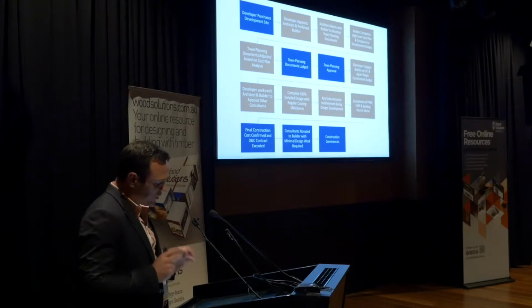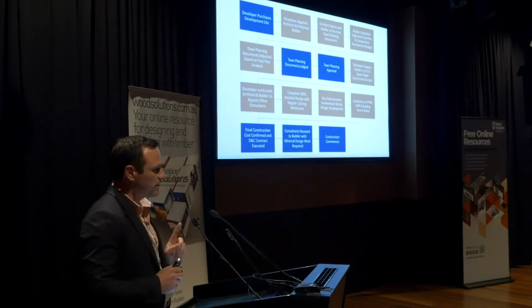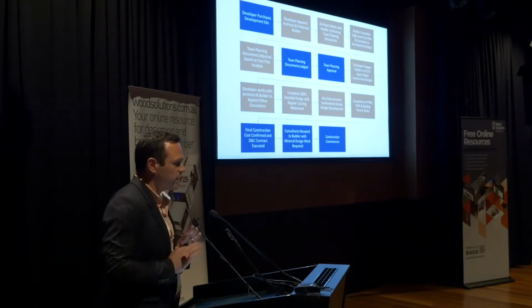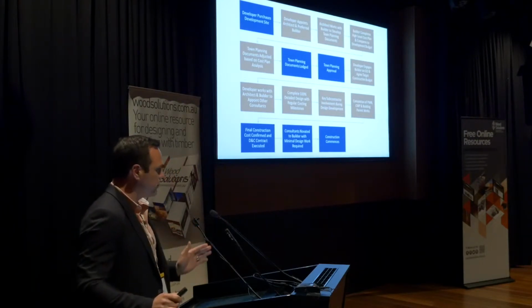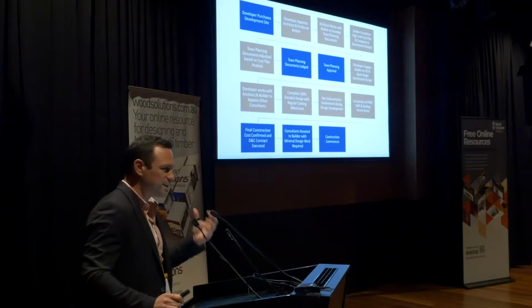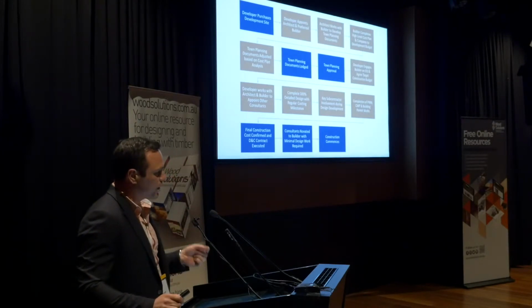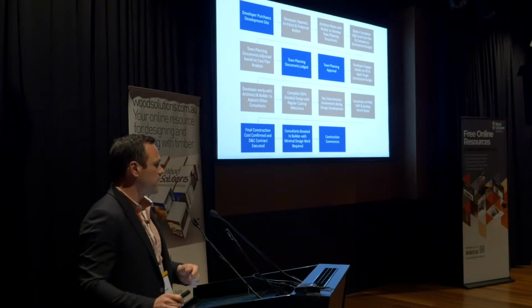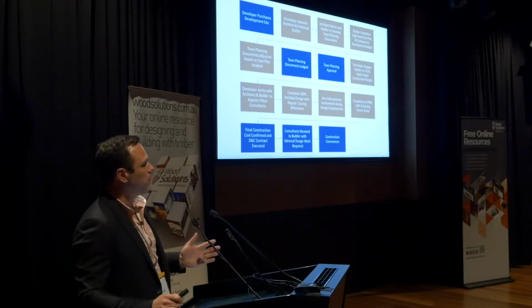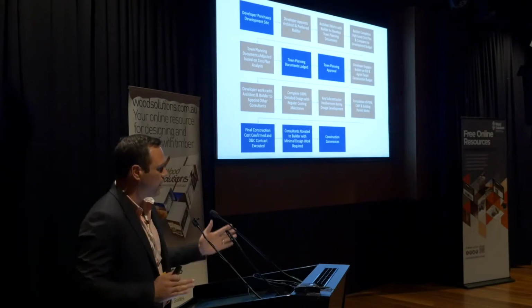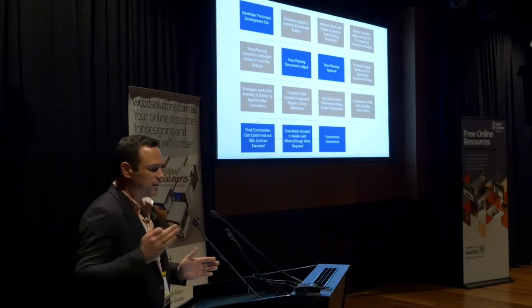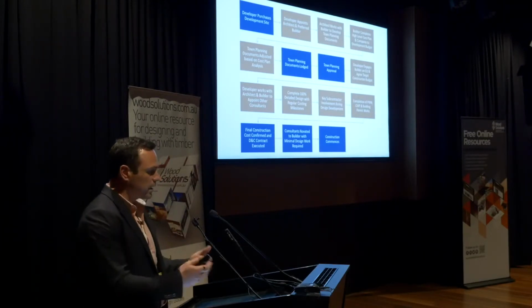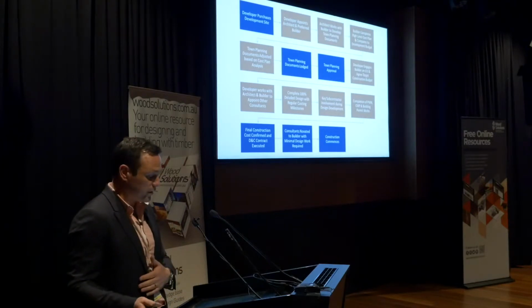Then the detailed design is completed to 100%. So we're de-risking the whole thing. We're designing it to 100%. It's finished. This is where BIM comes in. This is where prefabrication, you actually factor all of this in. And there's regular costing milestones. So maybe at 60% we'll do a cost. Are we tracking well? Yes, no, let's adjust something. 80%, 100%. So you're not waiting to the death to see how much it costs. There's regular communication with the developer during that process.